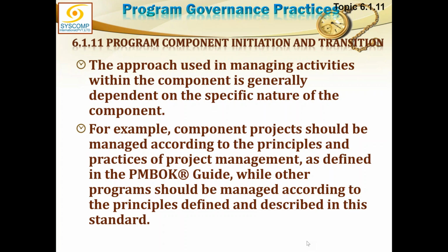So the PMBOK standard will apply to the components or the projects, while other programs should be managed according to the program management standard. If the component is a program, that subprogram will again be guided by the program management standard, and should be managed according to the principles defined and described in this standard. Components could be subprograms or projects. If project, governed by PMBOK. If subprogram, governed by the program management standard.